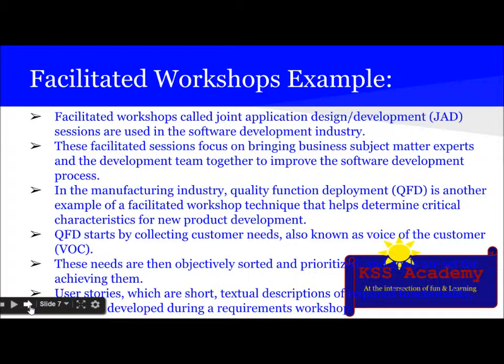Facilitated workshops called Joint Application Development or JAD sessions are used in the software development industry. These facilitated sessions focus on bringing business subject matter experts and the development team together to improve the software development process. In the manufacturing industry, quality function deployment is another example of a facilitated workshop technique that helps determine critical characteristics for a new product development.